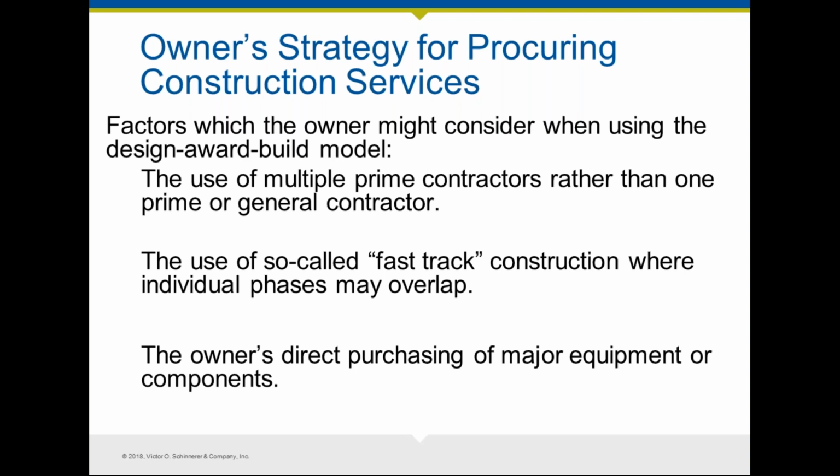The owner may have experience with particular equipment models, and therefore does not want to go through that procurement process through the contractor. All of these alternatives may provide cost, schedule, or other benefits to the owner, but there's also an increase in risk to the owner.